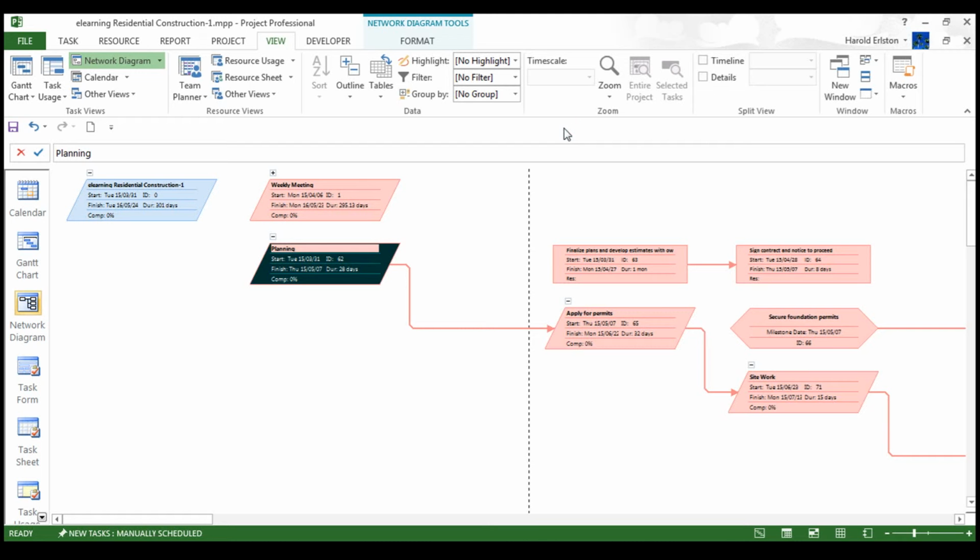As we review through our task relationships, you may find that some tasks do not actually depend on each other as indicated in the schedule. You can reschedule tasks by modifying the task links. When we do this, Project automatically recalculates the project schedule. We mentioned the different task relationships earlier on. I'm going to just mention them again.